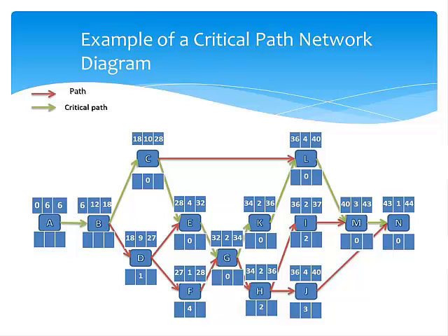So, an example of a typical problem for this technique would be to reduce the overall project time. At the moment, the project time is 44 weeks. To reduce the project time, activities on the critical path have to be crashed, although there is an additional cost for crashing the activity. However, time saved from crashing the activity reduces the overall cost of the project.